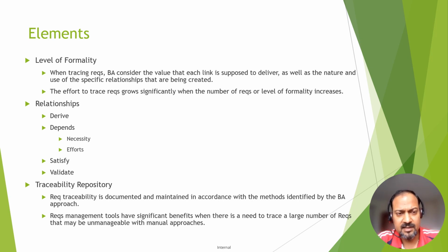We have dependency, and here we have necessity and effort. So the necessity is when one requirement needs another requirement to be done together, and the effort is when, if you do one requirement alone, it will take a lot of effort. So in order to reduce the effort, another requirement needs to go together with that. So that's effort. For example, for the necessity, you have created a login screen.